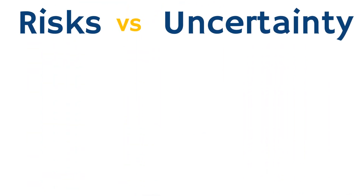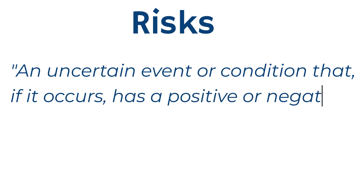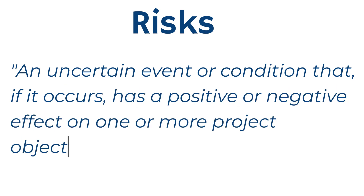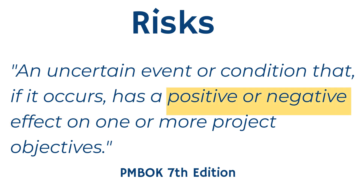Now we know the difference between a risk and an uncertainty. We can define a risk as an uncertain event or condition that, if it occurs, has a positive or negative effect on one or more project objectives. This is the definition as mentioned in PMBOK 7th edition, and it is one of the most comprehensive definitions because it encompasses all characteristics of a risk: it is an uncertainty that has a probability to occur and a measurable impact on project objectives. This impact can be positive or negative. Risks can also be events or conditions due to ambiguity, complexity, or volatility.